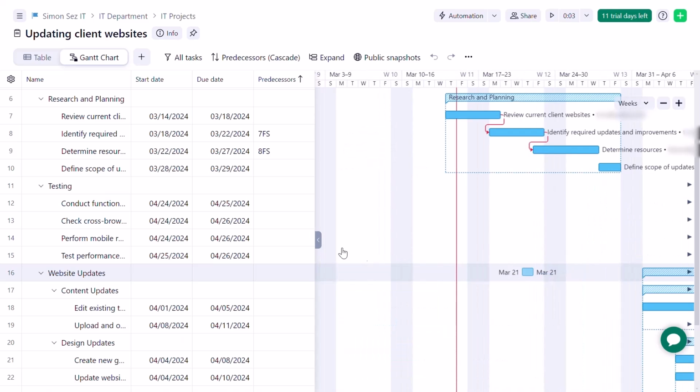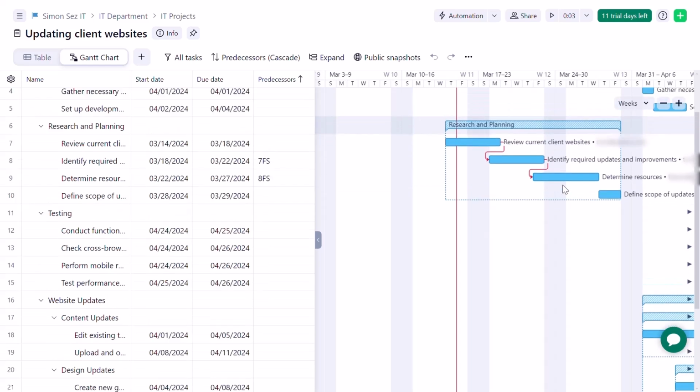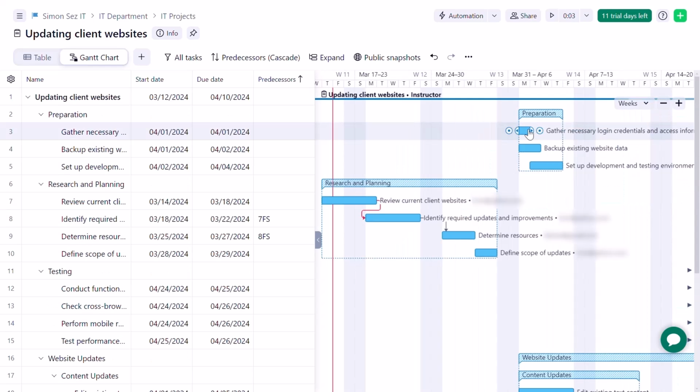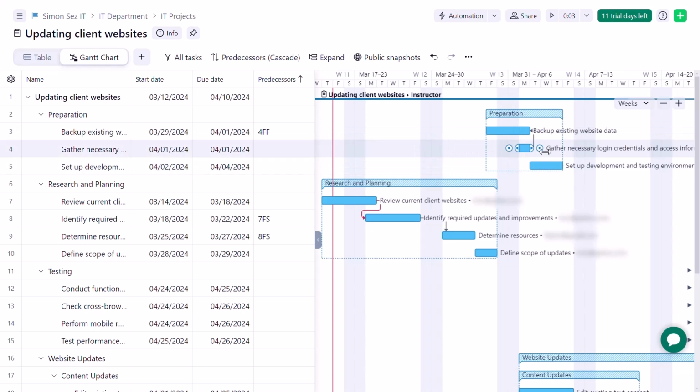Now, an interesting point about the Gantt chart is that I can add predecessors and successors very, very quickly using these arrows. So let's just move this over here. And I'll see that this whole setup, this whole timeline, based on this dependency, all of it is moved forward based on a single click. I can also relate these together. So maybe this one, start from here, and I take an arrow all the way till here. And once these are connected, I'll see that a dependency is added over here.